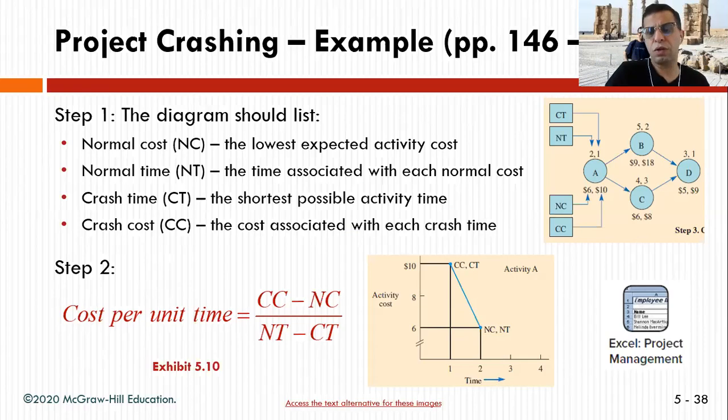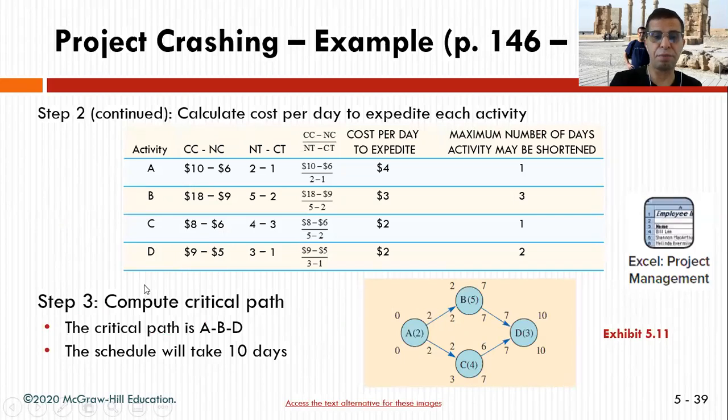And you know in a project, there's always a variation. So you say, if I'm putting pressure on my team, it's going to cost me that much, and it's going to finish in shorter time. But if we go normal, it's going to cost us a little bit higher, and a longer time, or a normal time, something like that. So you do these and you find, in this timing, what's the unit cost, and in this timing, what's the unit cost, and you do the division as we indicated here. This is only a sample.